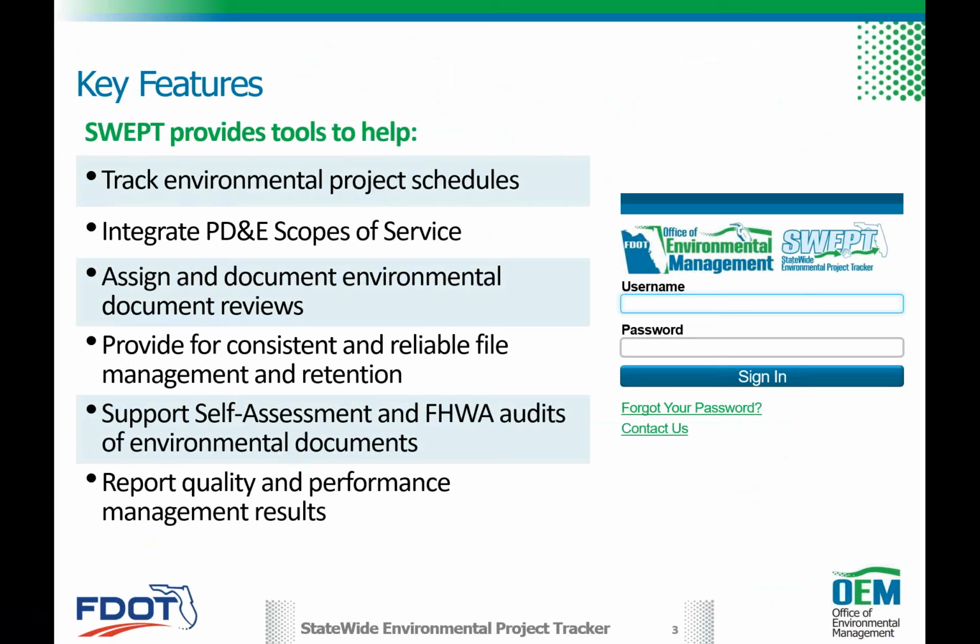Those district schedulers enter that stuff in Primavera, and then ultimately they submit those uploaded schedules into the Project Schedule and Management system. We call it PSM. Well, for PSM, it became important that we all use the same codes to mean the same thing. So we developed a set of 700 series PSM codes to facilitate a consistent set of milestones per varying classes of action to know how we were going to manage a schedule.